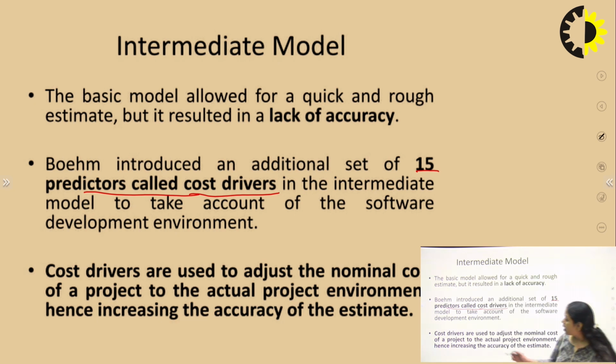Cost drivers are used to adjust the nominal cost of a project to the actual project environment, hence increasing the accuracy of the estimate. So we can say that in the intermediate model, we will try to improve the results of the basic model by using the cost drivers. Now the question is, what is the meaning of this cost driver? So we will see here.